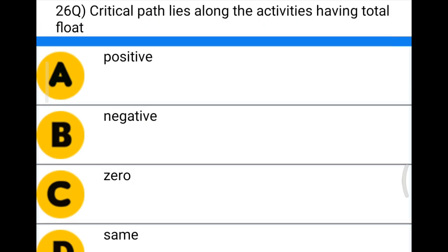Next question: the critical path lies along the activities having a total float of — Option A: positive, Option B: negative, Option C: zero, Option D: same. The correct answer is Option C, zero.